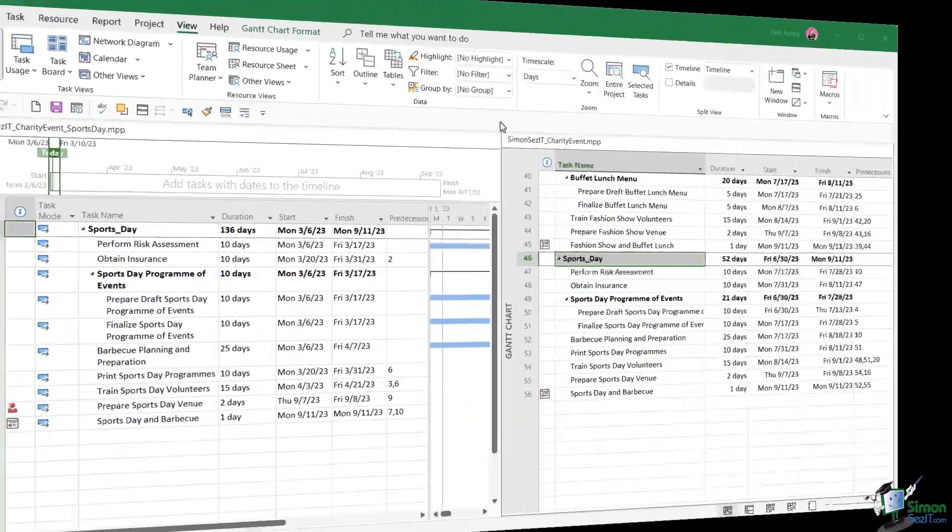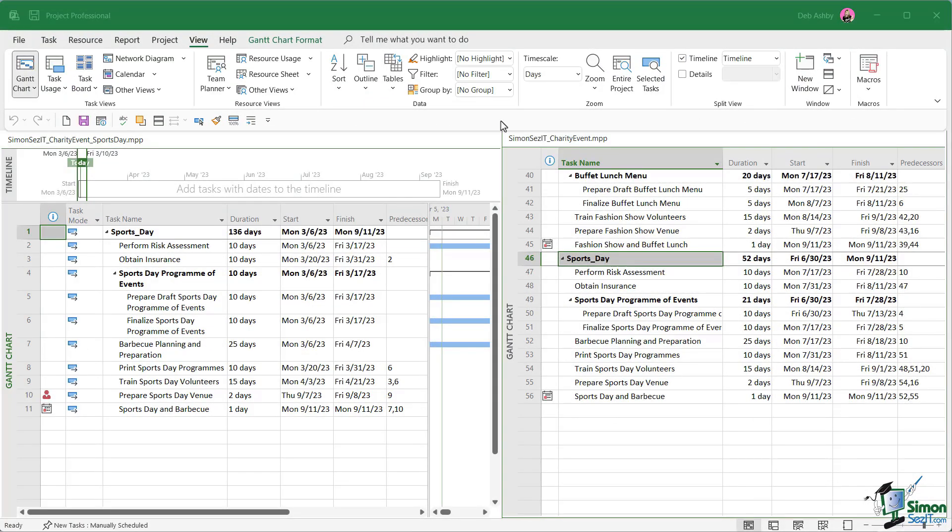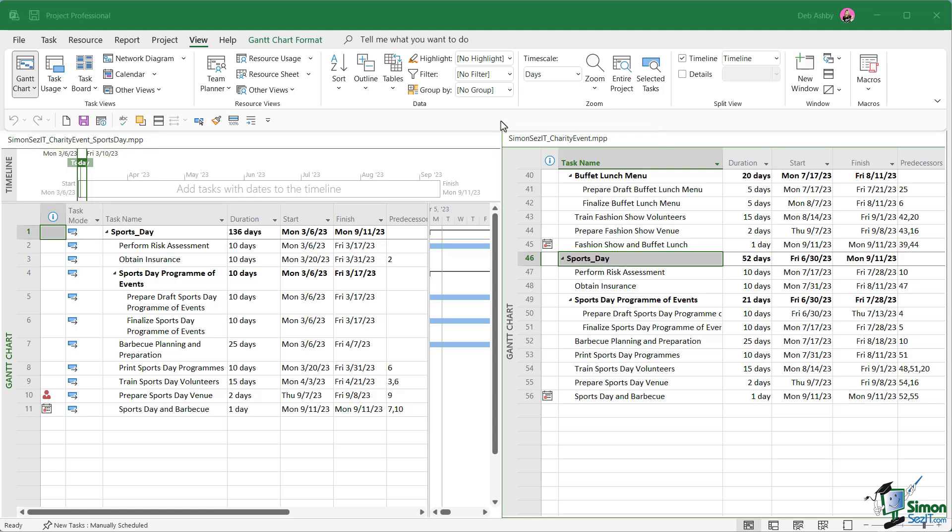Currently we have our two files and you can see that I've got them both open on the screen just here. Now, just a quick side note about Project and opening multiple files. What you'll find is that if you try and double click in File Explorer to open two separate project files, they open in the same project window because we only have one project license. It's not like an application like Excel where you can have multiple Excel windows open to view different files.